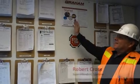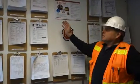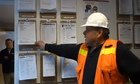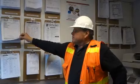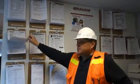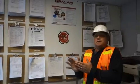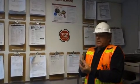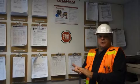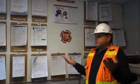This is basically our safety postings for the job site. Orientations, daily closeout, site inspections. We implemented this system, and we actually provide the tailgate meetings for our subcontractors. To date, we've had 1 first aid in the 2 years we've been here, and we attribute that to following the safety program. Allison and Neil Solenkircher, I believe I'm saying that correctly, came down and set us up with a safety program. Basically, it was a program that was easy for us to follow.